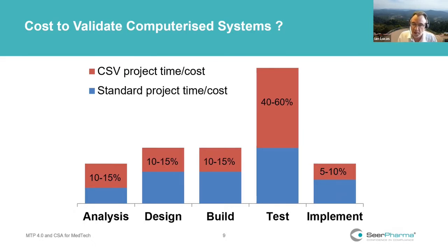And it's not just a matter that we're taking more time as a ratio split. We're actually taking more time as a length of a project because we have put these validation constraints. So in other industries, it may take 30 days. We may be taking 50 days to do the same thing. So this really means that we're actually spending almost twice the amount of time in the testing phase, typically on projects.